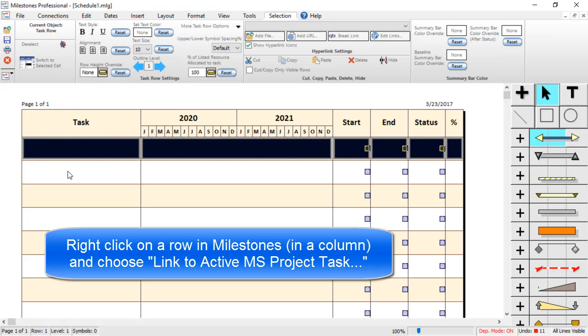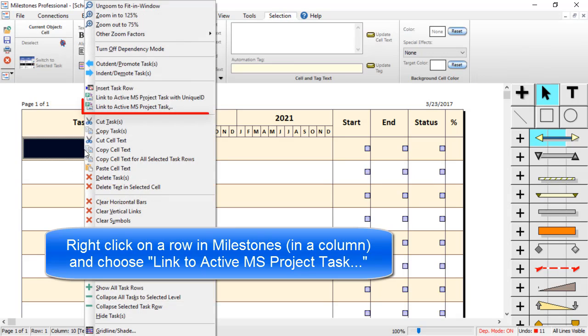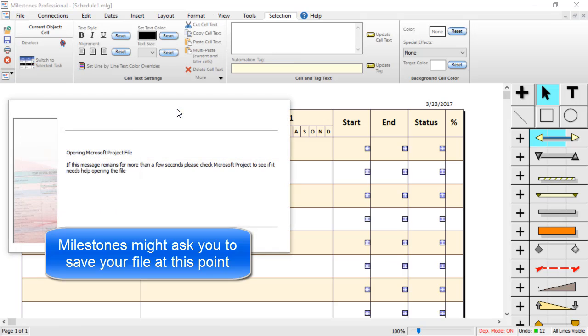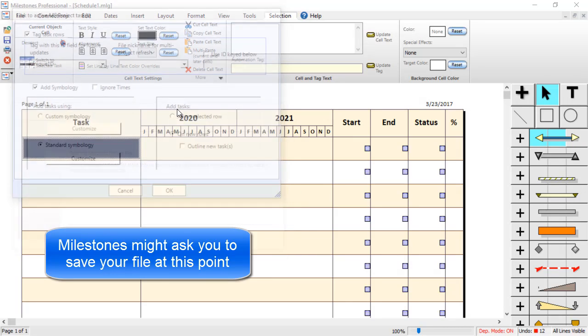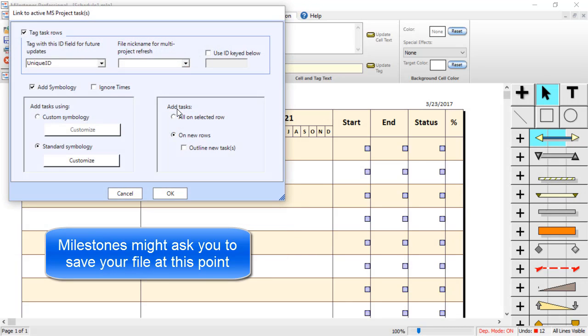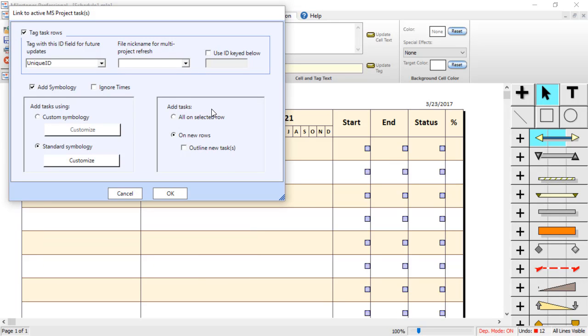Right-click on a task row in a column area and choose Link to Active MS Project Task. It might tell you to save your file at this point, so go ahead and do that. But then you should get the Link to Active MS Project Task dialog box.